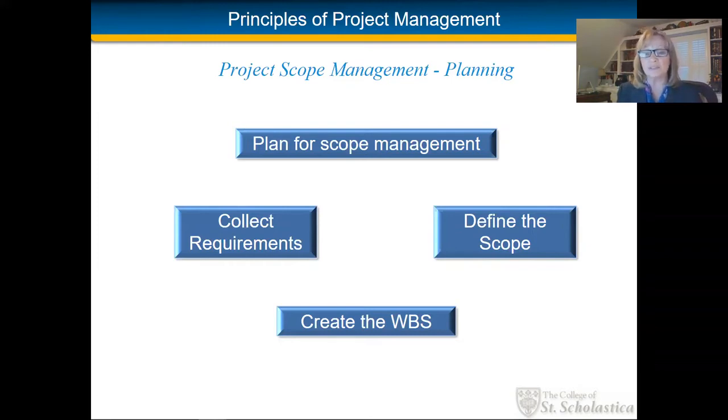The inputs, tools, and techniques for collecting project requirements may vary depending on your project, but the project charter should always be one of your key input sources, as all key stakeholders have agreed to the contents of the charter. The output to this process is the requirements documentation. Here is where you describe how the individual requirements meet the business need for the project.